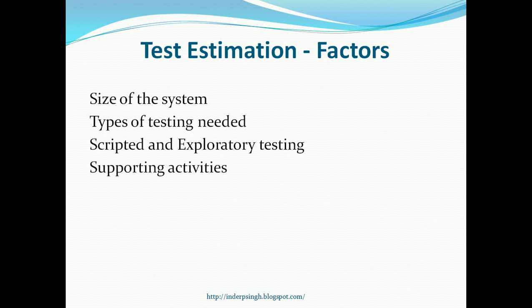In test estimation, we also need to consider the supporting activities. There are the activities of bug reporting, retesting, regression testing, meetings, entering time, etc. So all these are also included in the test estimation.